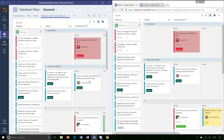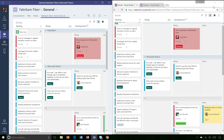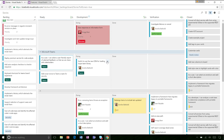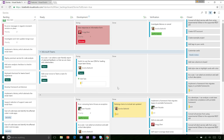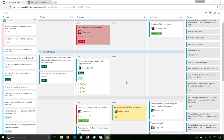So we're talking about the Kanban board and it's integrated inside of Microsoft Teams. Because it's a part of Team Services, I assume it has linkages and traceability through other parts. Does it link to branches or pull requests? Absolutely. There are quite a few abilities. You can add a child task and decompose your user story — it can be used as a quick checklist. You can also add a test or even create a new branch right off of the card you're working on.